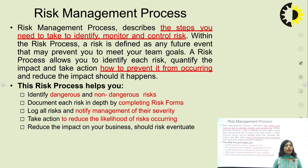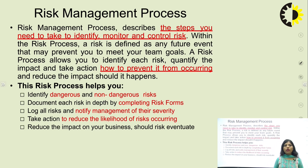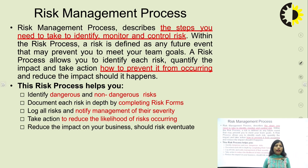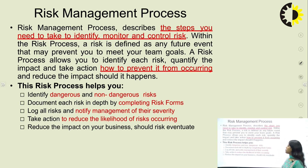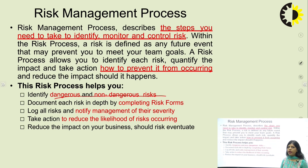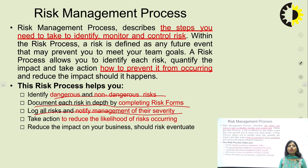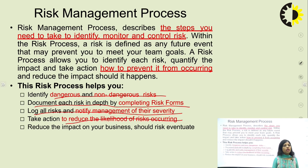The risk management process describes the steps needed to identify, monitor, and control risk. Within the risk process, risk is defined as any future event that may prevent you from meeting your team goals. A risk process allows you to identify each risk, quantify the impact, and take action to prevent it from occurring and reduce the impact should it happen. The risk process helps identify dangerous and non-dangerous risk, document each risk in depth by completing risk forms, log all risks, notify management of their severity, and take actions to reduce the likelihood of risk occurring and its impact on the business.